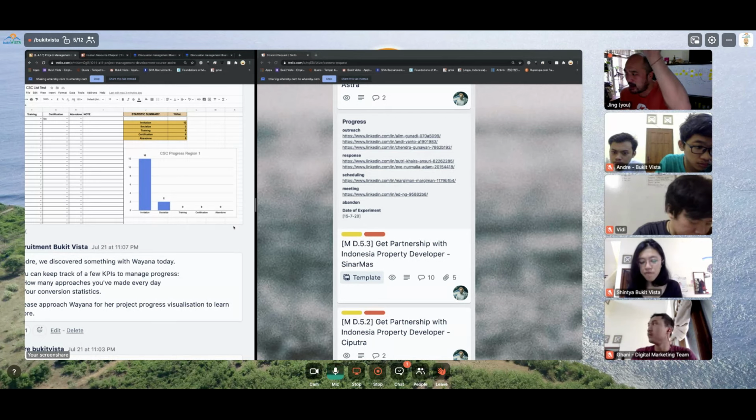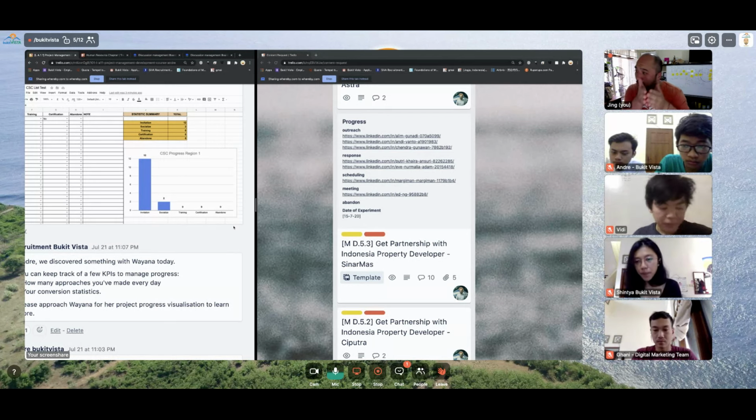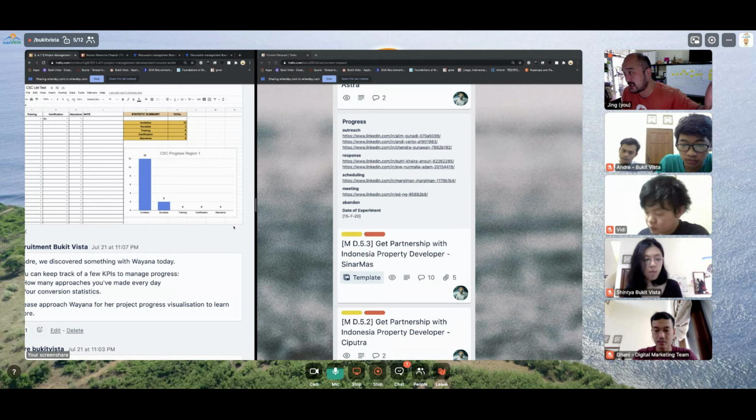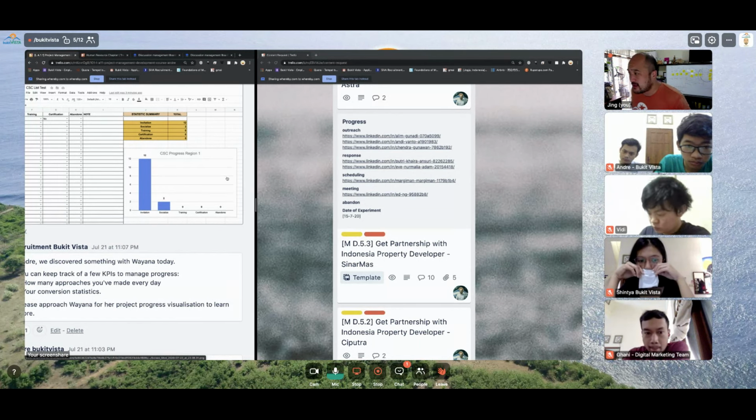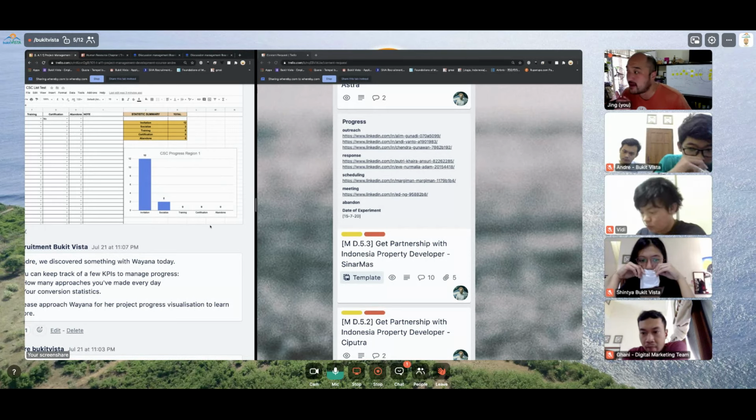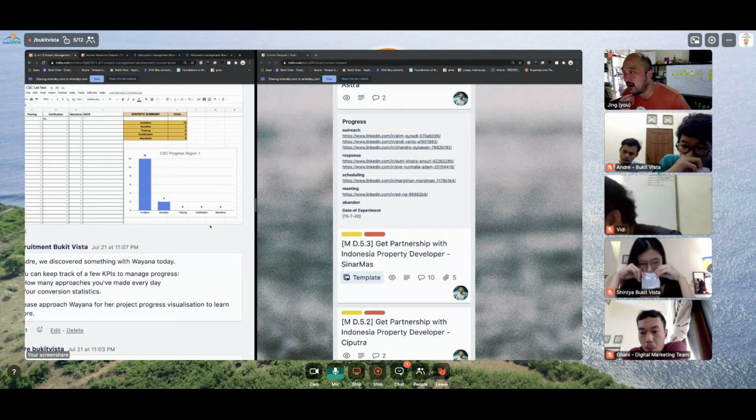But if you see that all this material is arriving and none of the manufacture is happening, then you go right to the manufacturing step and you say, this needs to be fixed right now. Otherwise, we get a bottleneck of all these materials coming into the factory. None of it is getting out. We have a problem. But let's say the manufacturing is going smoothly, but now the boxing stage is stuck, right? So all these shoes are sort of overflowing now in the middle step. And then looking at this particular flow diagram, a project manager can tell where specifically to prioritize.